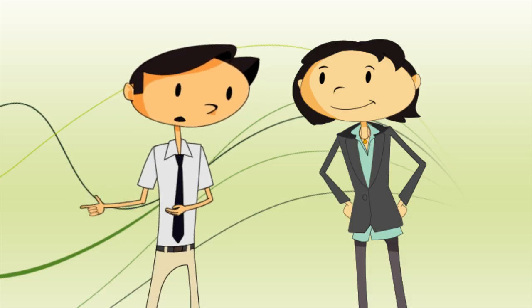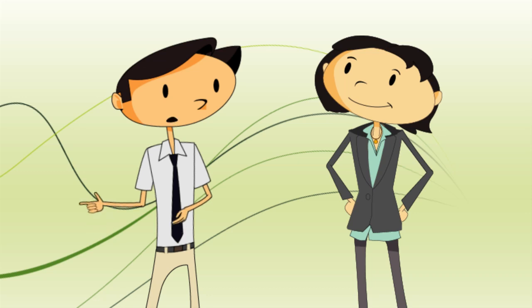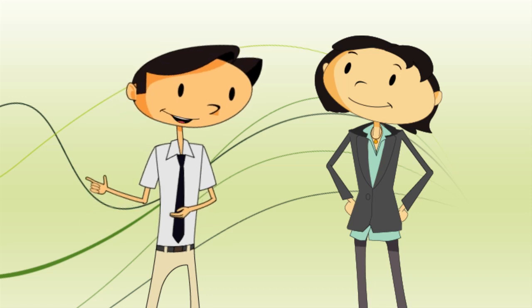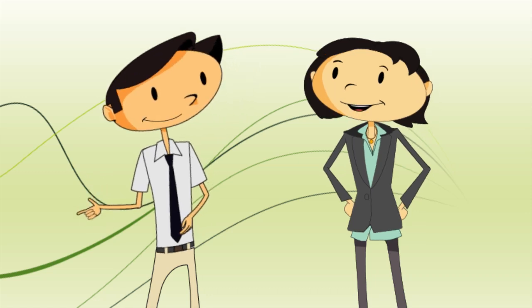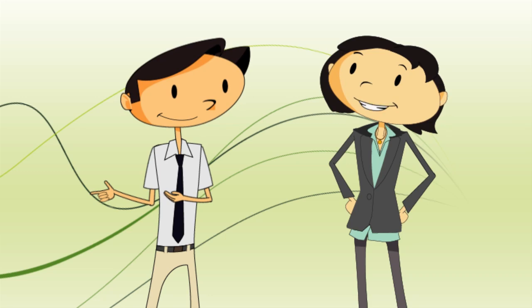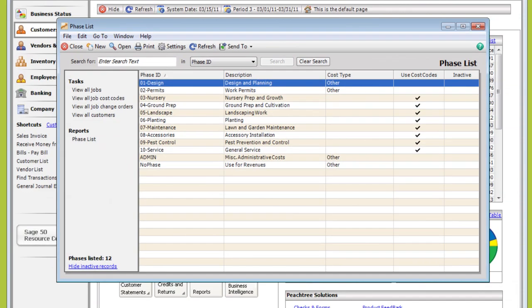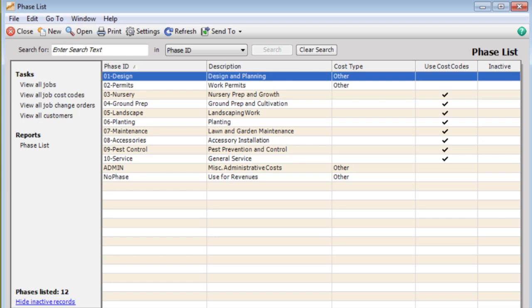Some of my work gets more complicated than that, though. Can I track projects that are comprised of a bunch of little jobs? Sure, but you'll want to set up phases. A phase is a chunk of work you can track separately. You can get paid when they're complete and be able to see how much a certain phase costs.